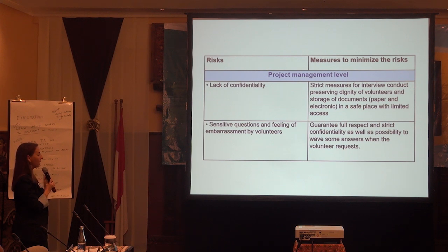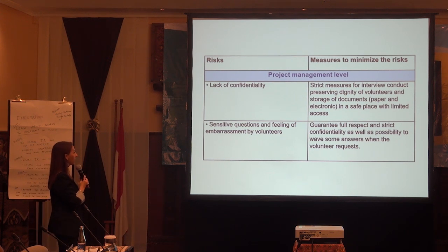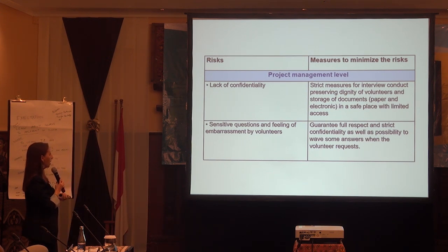Concerning the project management level, we have 2 risks also. The lack of confidentiality, and for that, we have strict measures for interview conduct, preserving dignity of volunteers and storage of documents in a safe place with limited access. The second risk is the sensitive questions and feeling of embarrassment by volunteers. And for that, we have to guarantee full respect and strict confidentiality, as well as the possibility to waive some answers when the volunteers request.